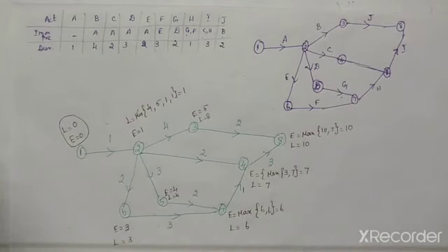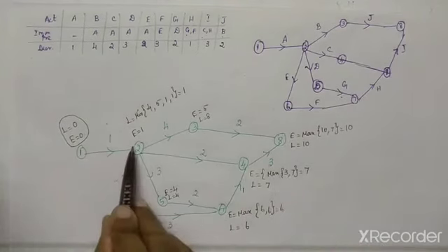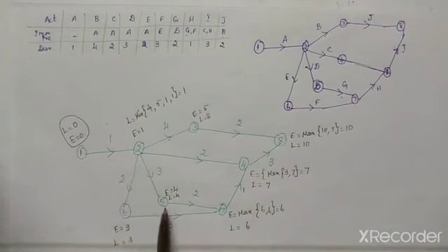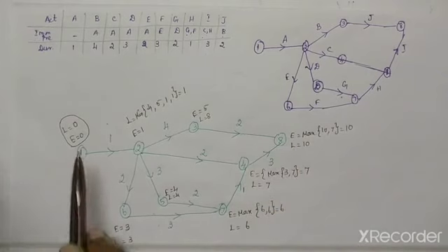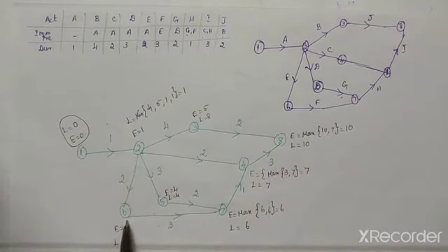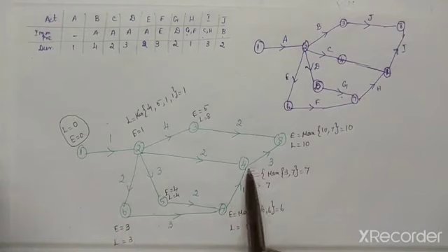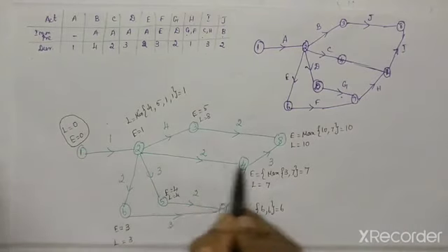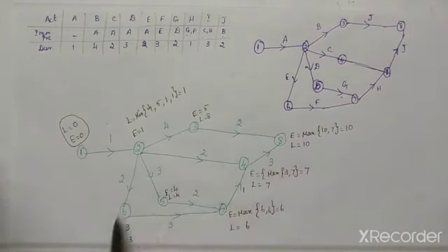This is one thing. The next one is 1 to 2, 2 to 3, 2 to 5, 5 to 7, 7 to 4, 4 to 8, which is another one. Next one is 1 to 2, 2 to 6, 6 to 7, 7 to 4, 4 to 8. That is also another one. So we have 3 critical paths. From these three critical paths, find out the total duration. Whichever has 10, that is your correct critical path.